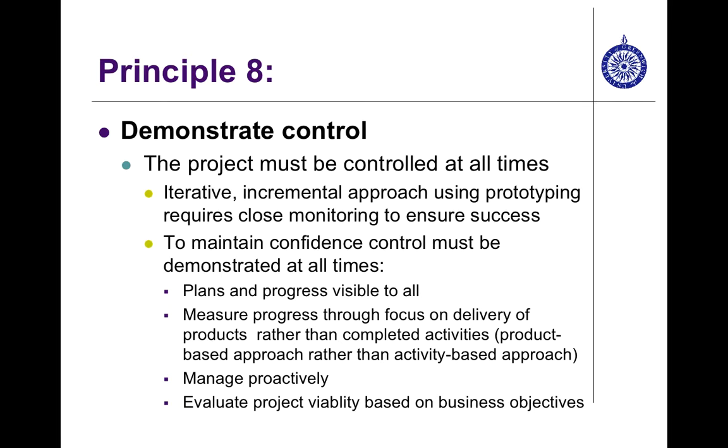And we will evaluate our project based on the business objectives that we have finished. For example, if there are around 10 business objectives, and at the end our project meets 5 business objectives, the project can be considered ready to go live. That means the project can be used, as it meets the minimum requirements.